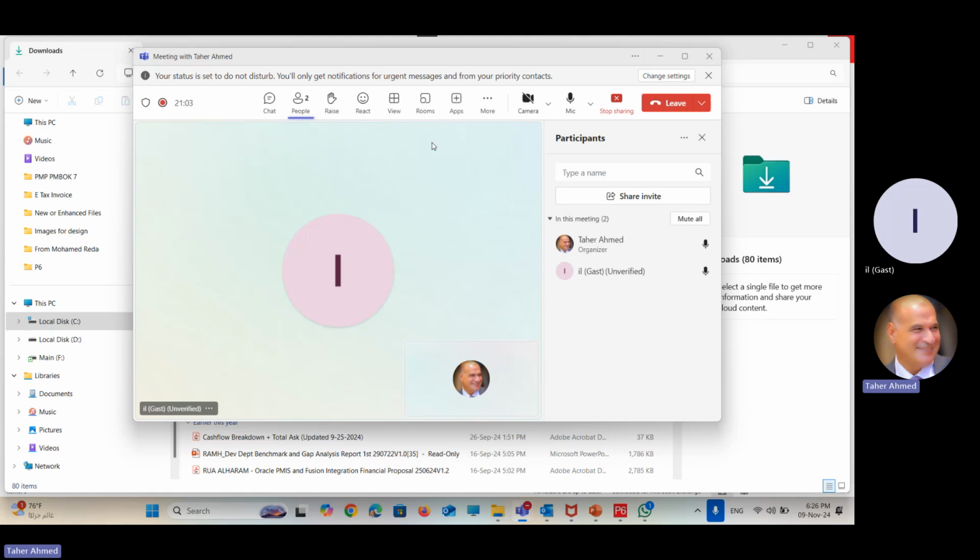There are 2 reasons that Primavera stops creating the project. The first is when you provide a non-unique, repeated ID, and Primavera will refuse to create the project. And the second reason is making the planned start date empty. It will ask you about the ID, the name, then the planned start date, the must finish by date, and who is responsible for this project, which we can choose from the OBS. What rate will be used in this project? We choose the standard rate.